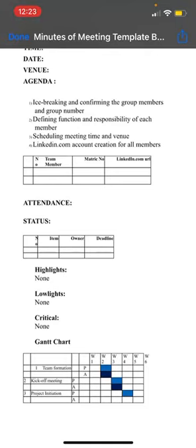So for the past 3 weeks, at least we have this status. The first one is a team formation, which happened in week 2 or week 3, okay? So you put that as a row to mention the status of being planned, and then the second row is the mention of it being accomplished. So if it's done on time, then it should be put in the same column, probably with a different color or different shade or something like that, okay?